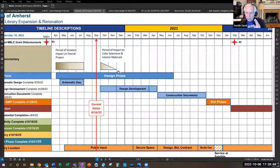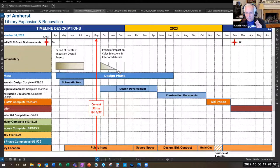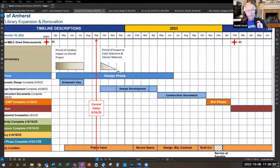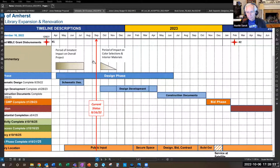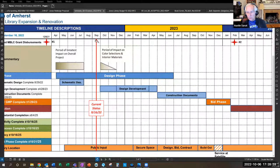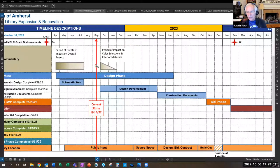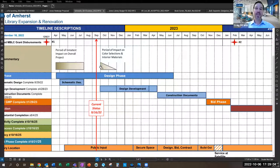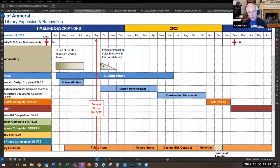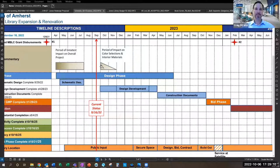Craig explains the triangle previously resided at the end of schematic design allowing comments to trickle into design development with smaller anticipated impact. Because the design team has been on pause for two months, that period has moved out. There's still opportunity to incorporate public ideas, but they won't have as much impact. When the design subcommittee reviews ideas, potential cost would be factored into decision-making.